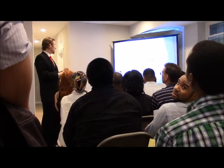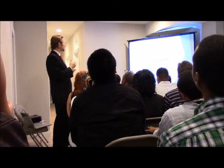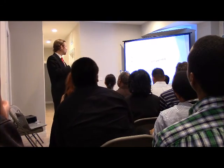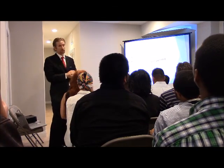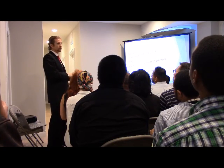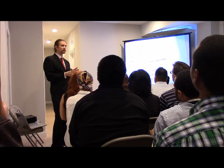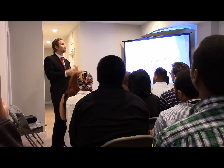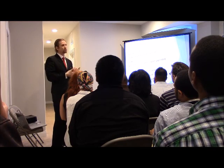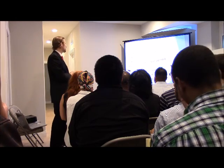So we applied for the demo permit. Again, we ordered that fence. You need to have that. Staking the lot, and then once the house is demoed, you apply for the construction permit to build. If this was just one lot, we wouldn't have to apply for those permits separately. Again, this is a unique situation where it was a house straddling two lots. If this was just a regular house, you could apply for everything at the same time. But since this straddled two lots, the way to speed up the process was to knock it down, then apply for the construction permit.